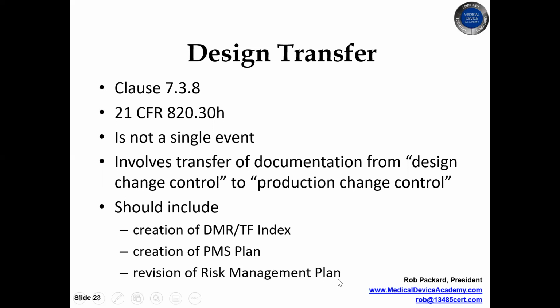At the beginning of the design process, you had a risk management plan that took you through the design process, but now you need a risk management plan for collecting post-production data and documentation from the field on risks, and you need to update your risk management documentation as you go along, as you collect complaints, as you perform service, and as you gather more post-market clinical follow-up data. So I recommend combining your post-market surveillance plan and your risk management plan into one post-market combination document. And I usually include that as a reference in this DMR tech file index.